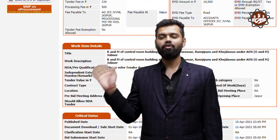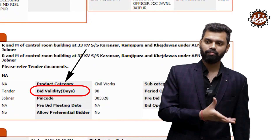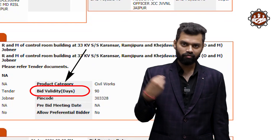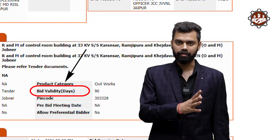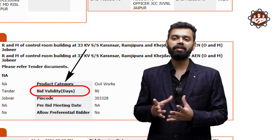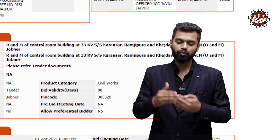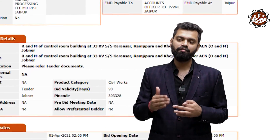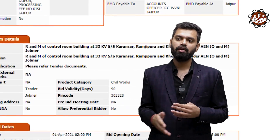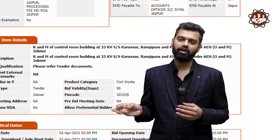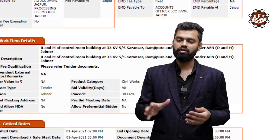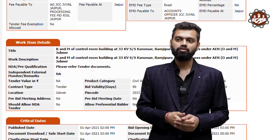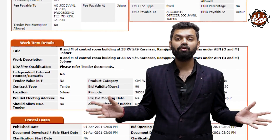The last component is bid validity. Suppose 50 contractors participate in the bidding — all their bids are considered valid for a certain period of time, such as two or three months. After that period, the bids of all 50 contractors are diminished and no longer valid.